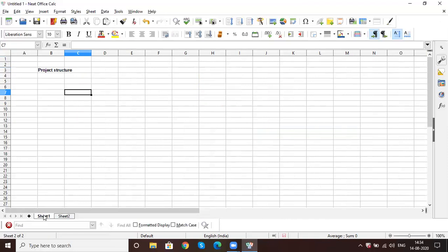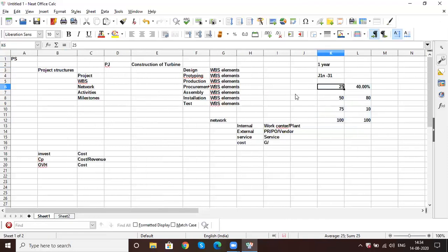No, it depends on the actuals. So it's not based on the time period. You said 25% of completion, in the sense after you realize that 25% is actually done, not a planned value. This is actual value.